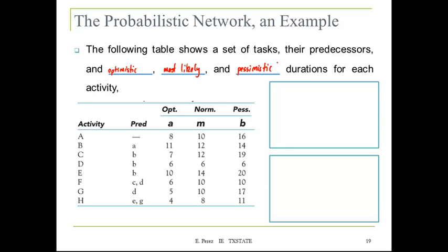So here we have, instead of having just one column telling you the duration of the task, a couple of estimates for the lower bounds and upper bounds. So you have a range of values for each task. We also have the predecessors for each one of the tasks. The information in this table is very similar to what we saw earlier, with the only difference that instead of having just one number for the duration, now we have 3.